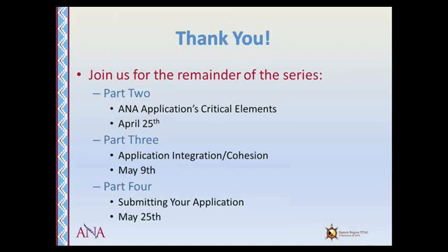Well, for the last question with regard to language projects, if it's a project where they're teaching the language, they definitely would need to get a little bit more community involvement than if it was a project where they were maybe developing curriculum. We've seen a number of projects that were involving teaching, and really the community wasn't that interested in learning the language, and they lacked participants. So he needs to look at what type of projects he's doing and base the number of meetings he has on what he's doing too.